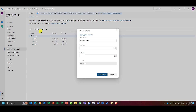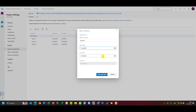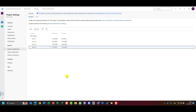Let me add Sprint Four as well. I select the start date immediately after Sprint Three ends, and Azure DevOps immediately recognizes that my sprint duration is two weeks and fills in the end date automatically. That covers iterations and sprints.